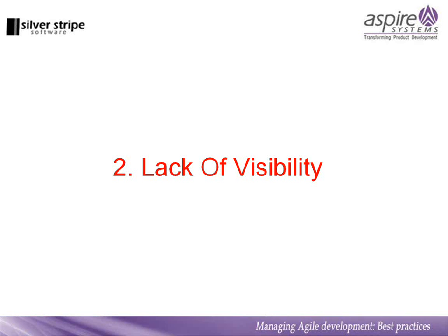The second risk is a lack of visibility. When the customer is giving you a project to do, the customer never really knows how far you are in the project because it's not until the end that software is tested. You could have done requirements analysis and coding and then found out right at the end when you're doing the testing that you've got a lot of bugs, which basically negates a lot of work which you had done previously. And you suddenly find out at that point that you're not as far down the track as you initially thought you were. And this is a huge problem.